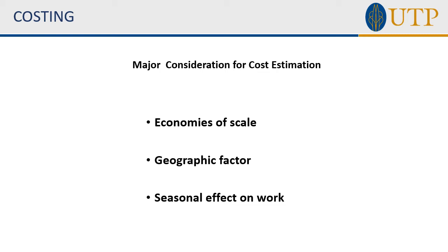The second one is the geographic factor. Since the site of the project is located in a remote area, there will be an additional charge since it is not easily accessible. The additional cost also comes from overseas shipping costs as some of the equipment is not available in Malaysia. Lastly, as the installation needs an expert, there will be another additional fee as there are no available local experts.